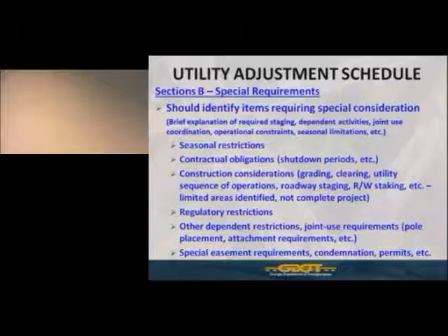Are there regulatory restraints? Various restrictions based on other regulatory requirements, be it whether it's federally, state, or even local government. Something we see here on occasion is maybe there's noise ordinances by a local government. And if you had intentions of doing your relocation work, say at nighttime when these noise ordinances did not allow such work, those are things you need to identify here and make sure that you've captured in this adjustment schedule.